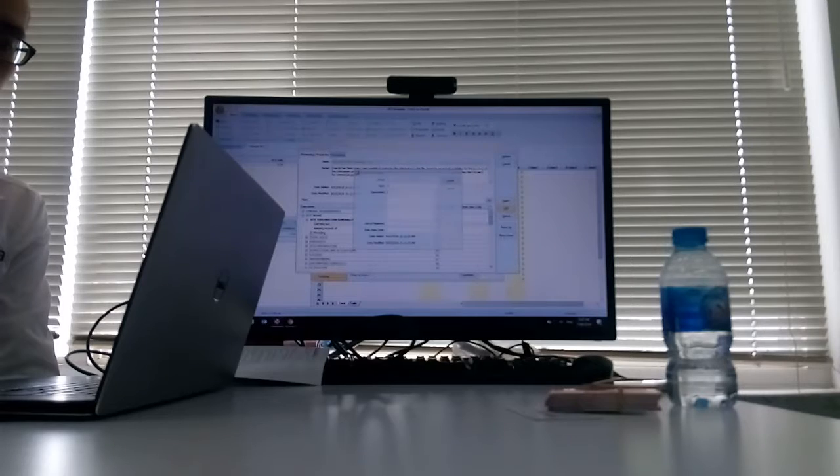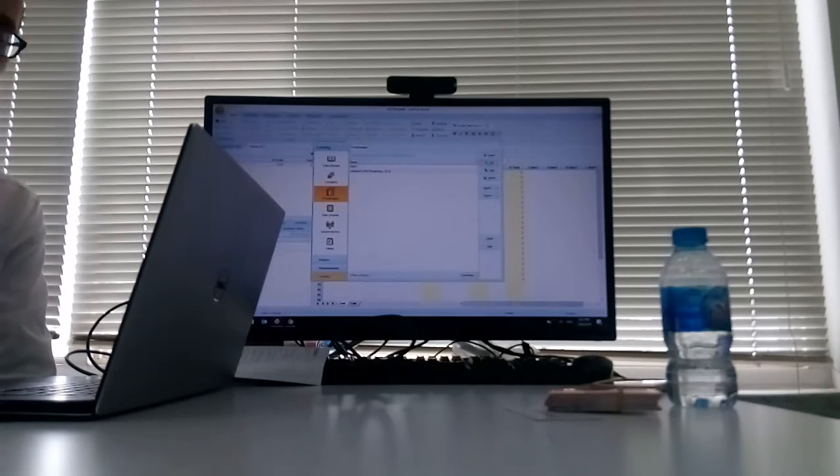So there are some examples whereby POMI doesn't have enough detail to allow us to do proper measurement. It doesn't really help us, for example, with piling and diaphragm wall works. So for that particular section, we might adopt it from SESM 3 or maybe from another method of measurement, and have a set of preambles for that.